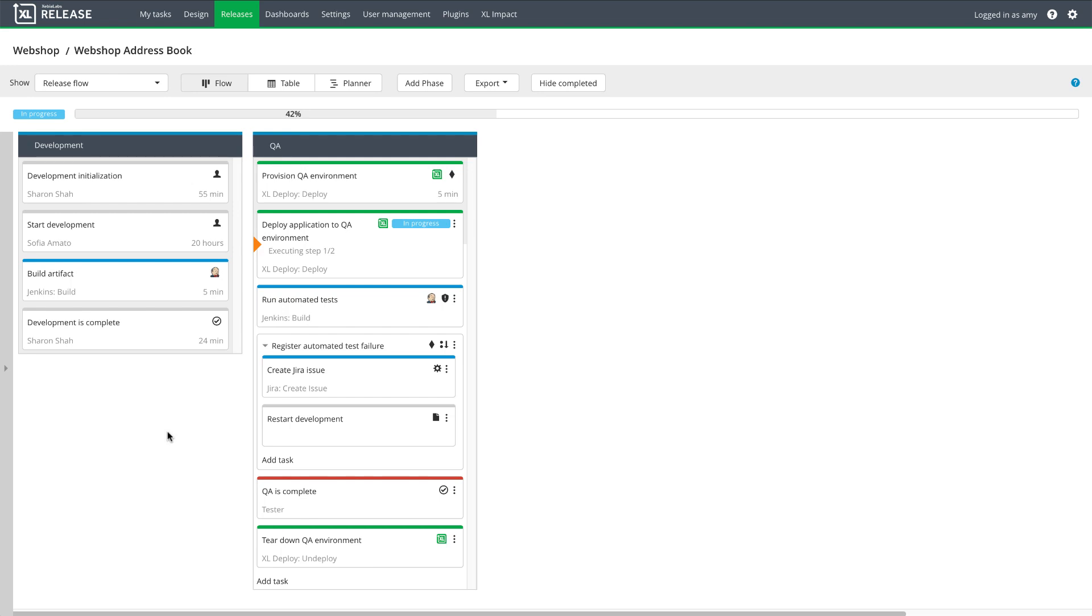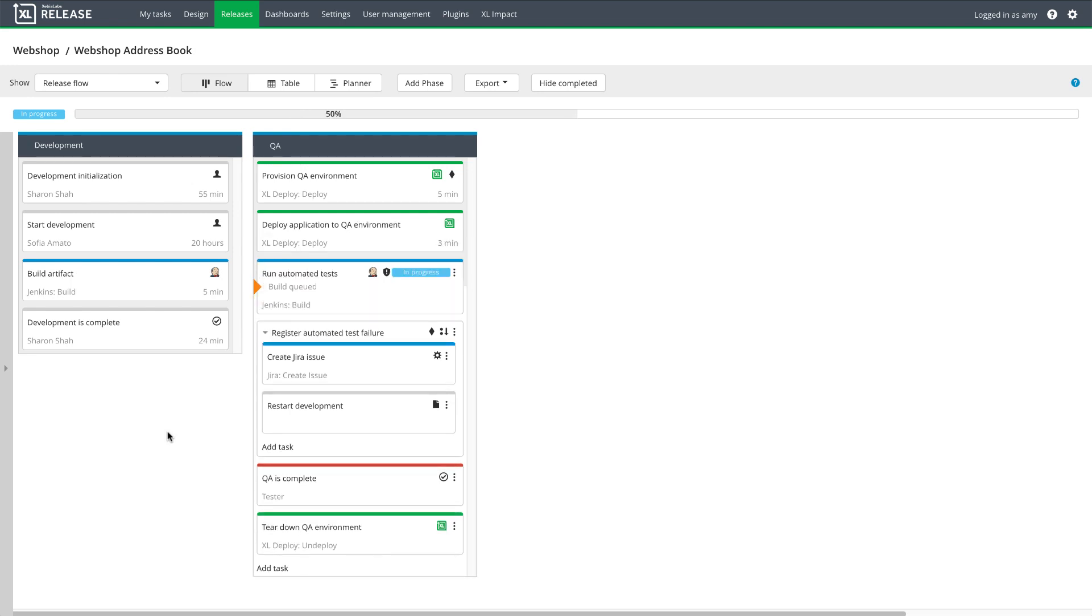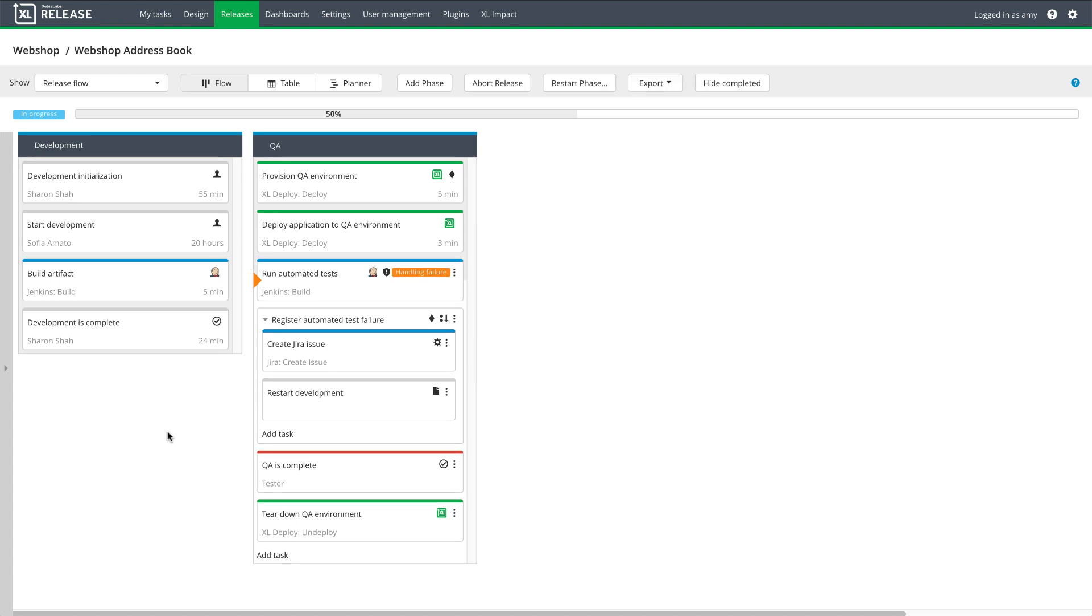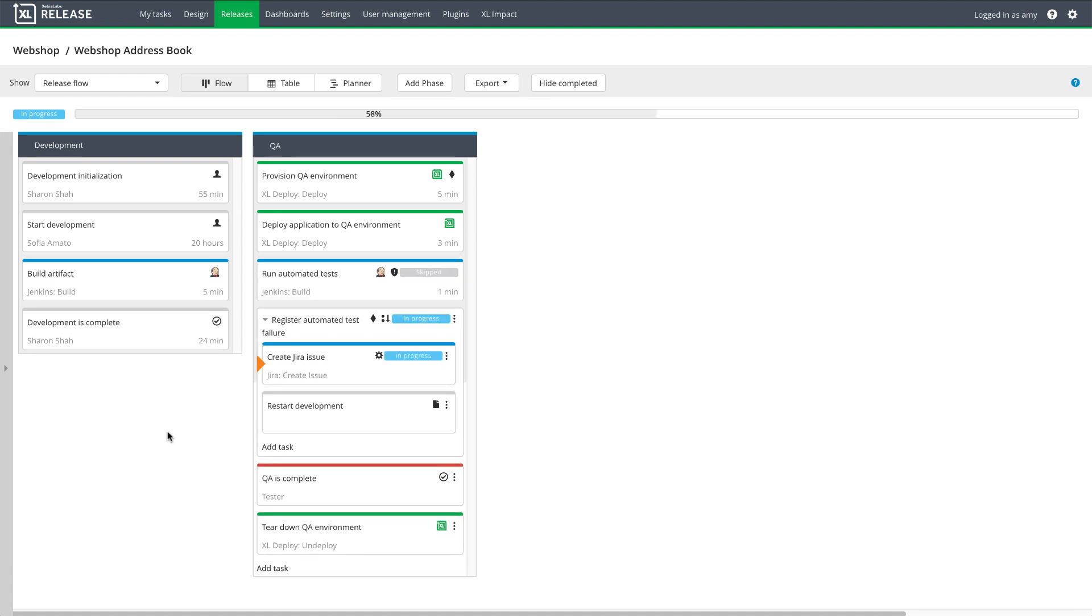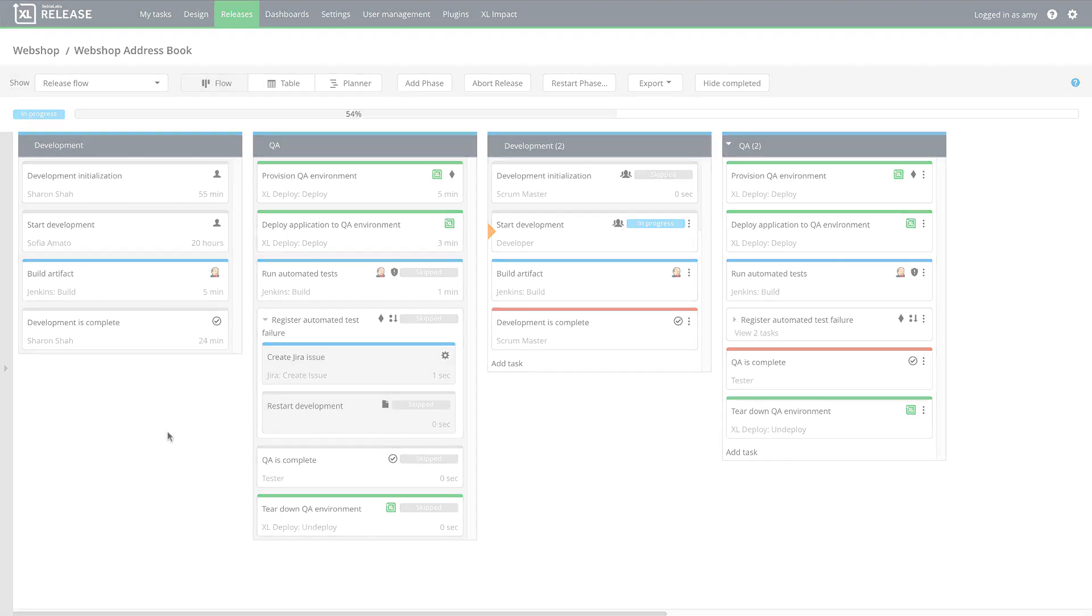XebiaLabs automatically provisioned a QA environment and deployed the application to it. But unfortunately, automated testing failed. This triggered XebiaLabs to create a JIRA ticket and automatically restart the process at the development phase. The development team will pick up the JIRA ticket, resolve the issue that caused testing to fail, and the process will continue on to the QA phase again. The team will continue this two-phase cycle until the feature is ready to be released.